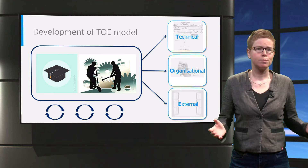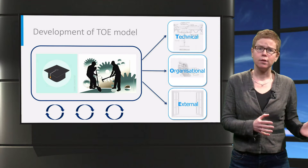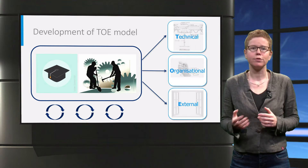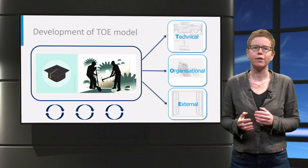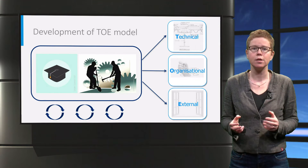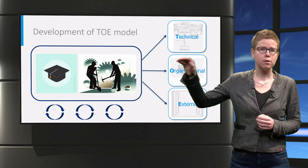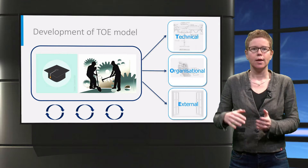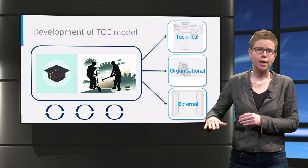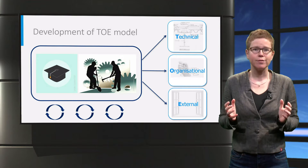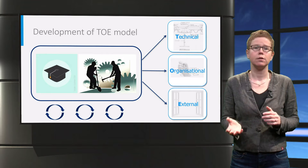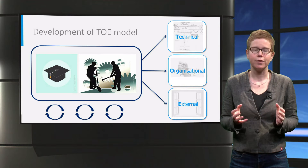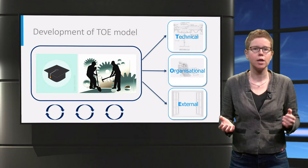First, we gathered as many potential elements as possible, both from detailed literature study and numerous interviews with practitioners. After careful consideration, we included 47 of the found elements in our complexity framework, consisting of two layers. The first layer is formed by the three dimensions: technical, organizational, and external complexity. The second layer is the 47 elements each assigned to either the T, O, or E dimension. The final list was validated in two subsequent studies involving more than 100 projects.